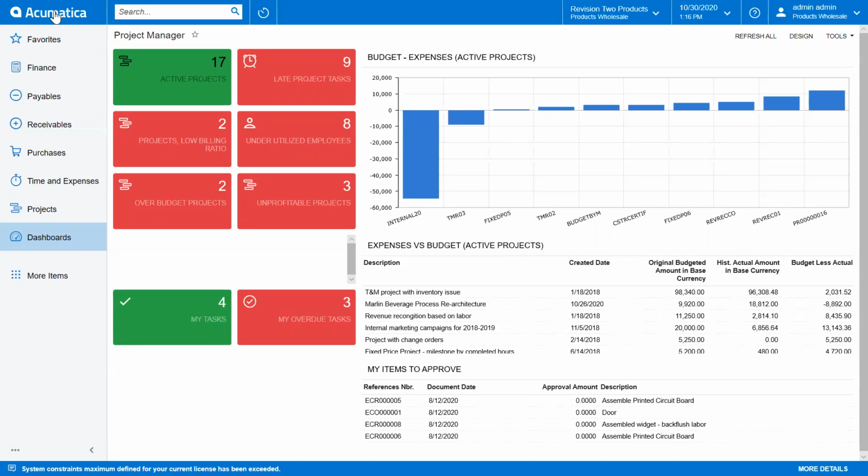A good example of how you could use a billing rule is if I have clients that retain our organization, if a consultant goes on site and he is out there for less than 4 hours, so he bills 3 hours, our policy is we're going to automatically bill for 4 hours. So if under 4 hours, we automatically bill for 4 hours.